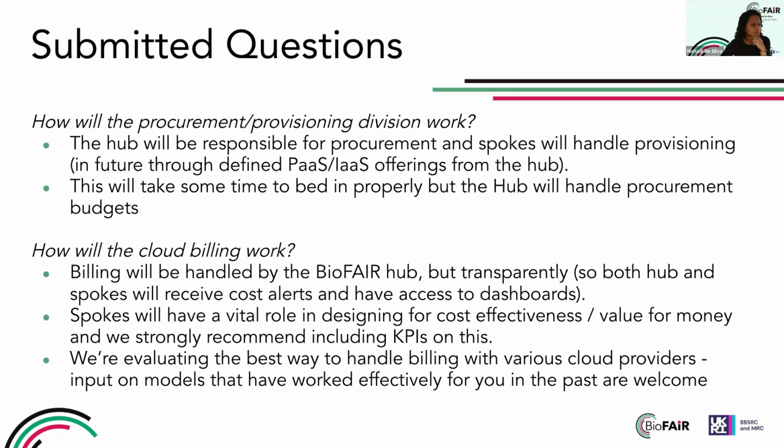How will the procurement provisioning division work? Yeah, this is a complicated one. So we're working on a model where the hub is responsible for procurement: purchasing of services, purchasing of infrastructure, potentially purchasing of hardware, and purchasing of cloud credits. So actually, the procurement is the responsibility of the hub. But in terms of provisioning infrastructure, like do you need VMs, do you need GPUs, how much storage do you need, we need those to come from the spokes.